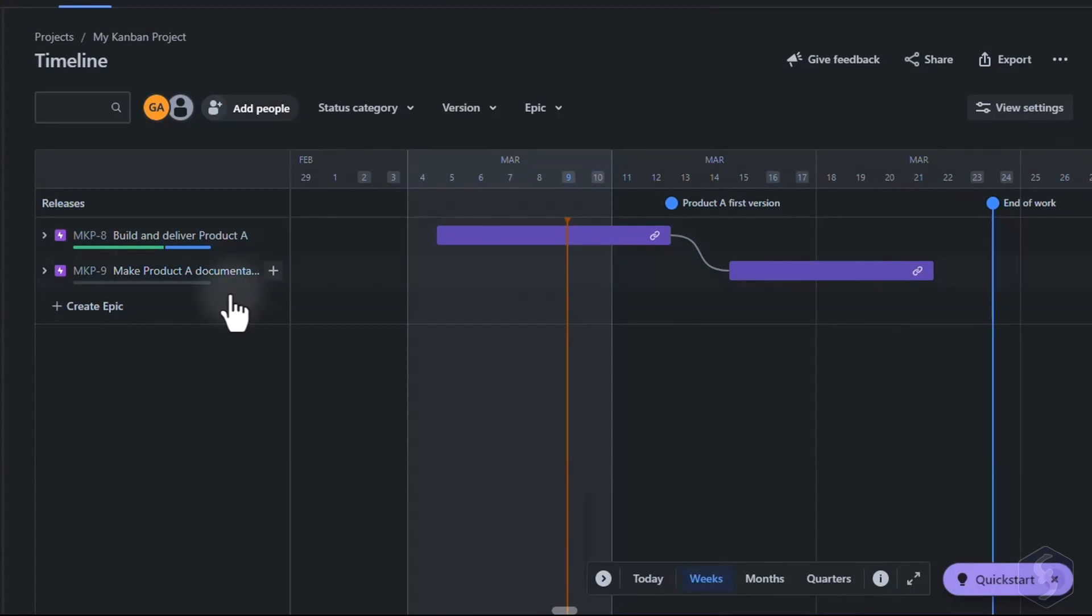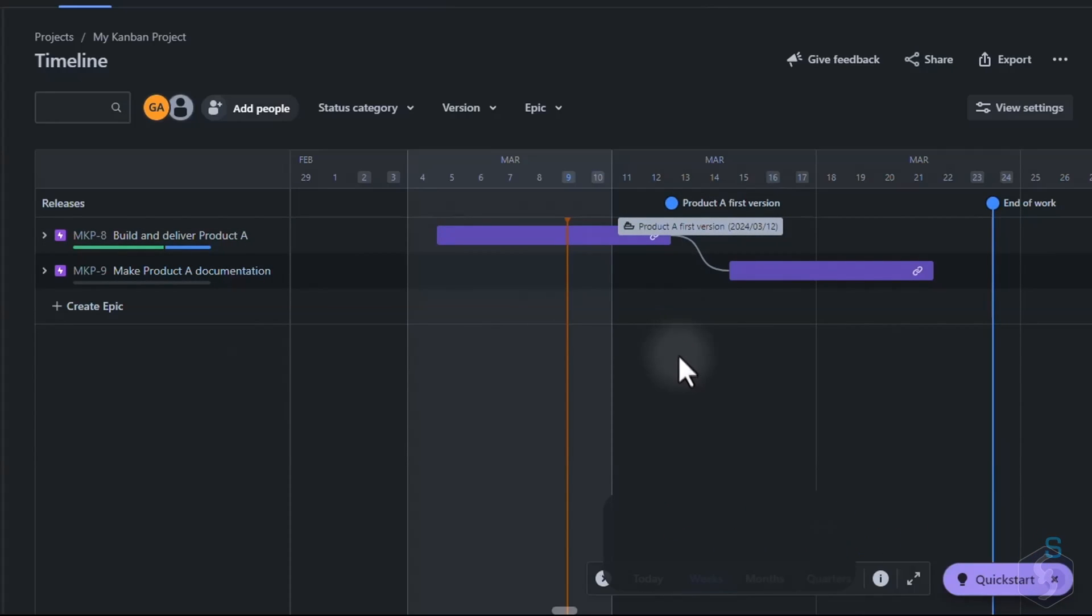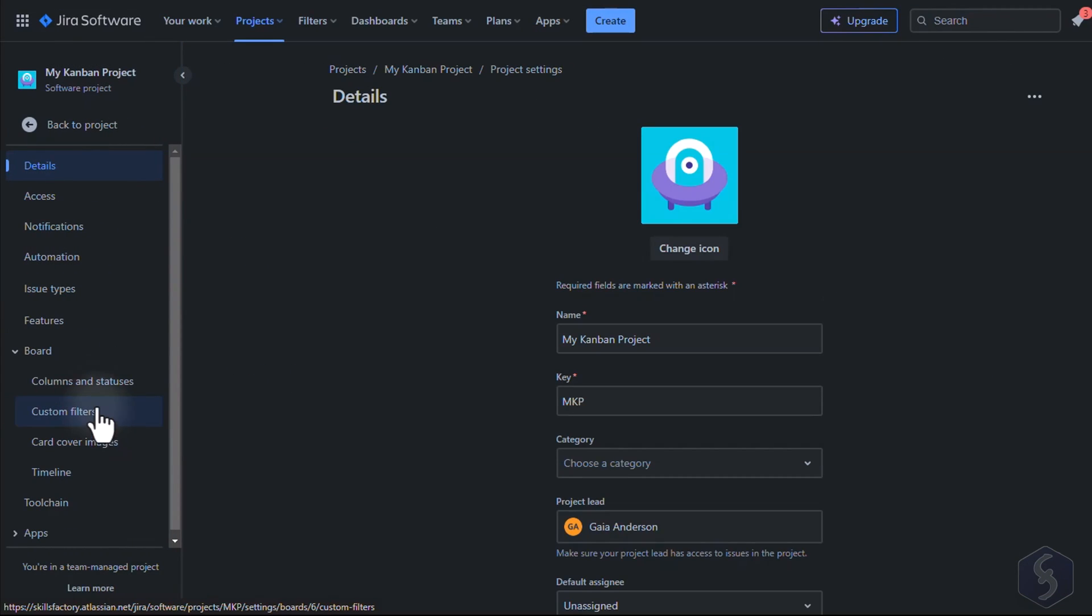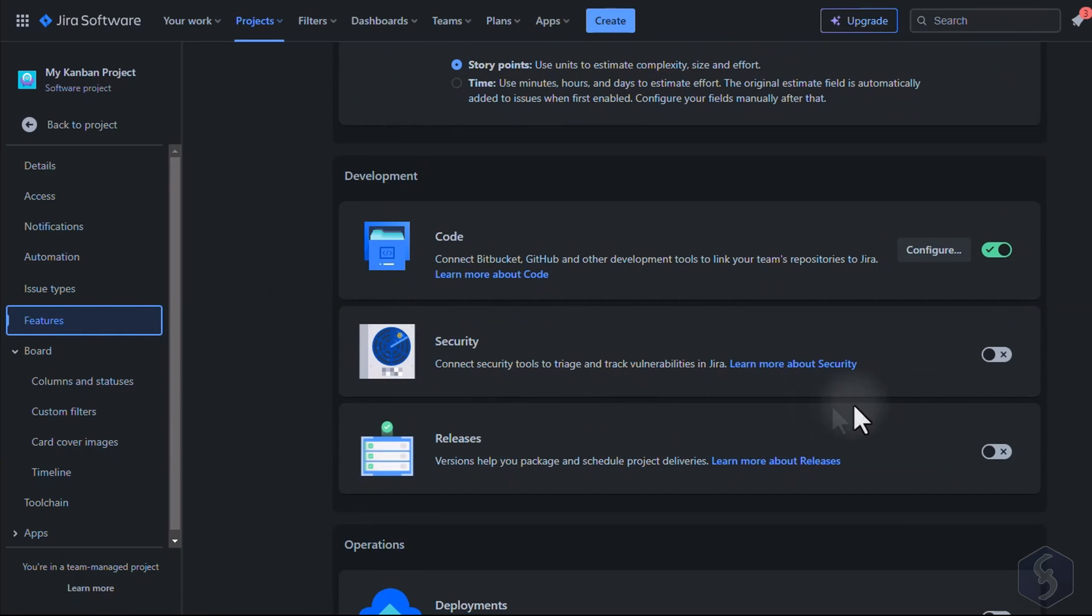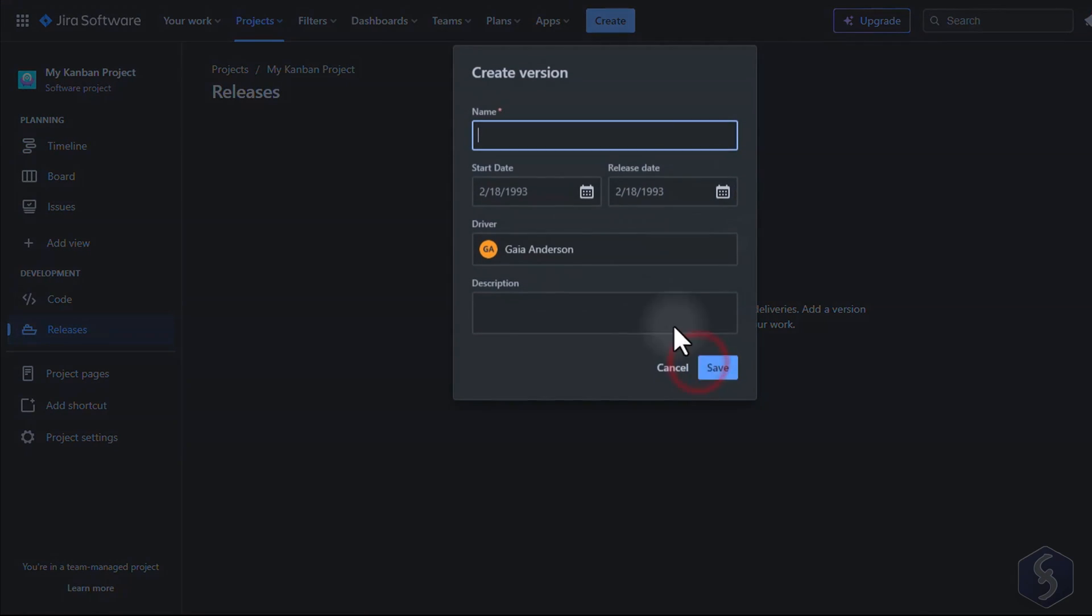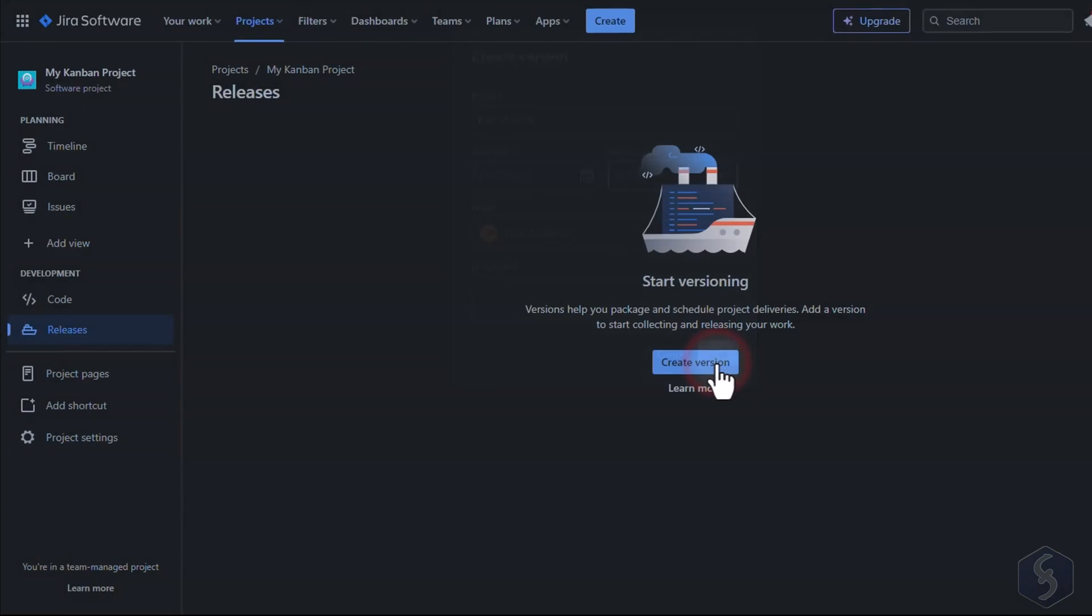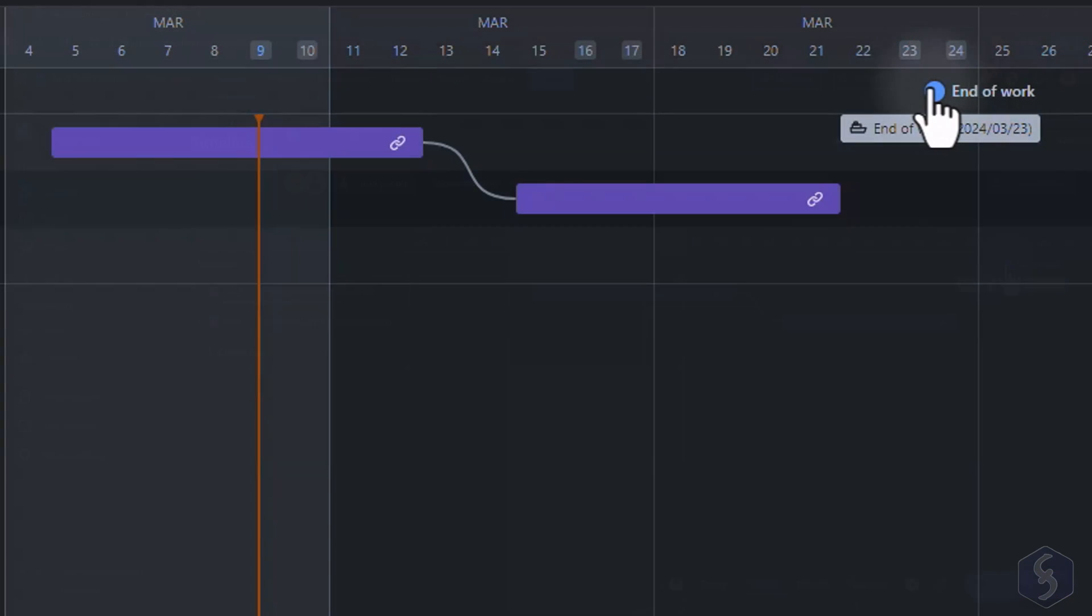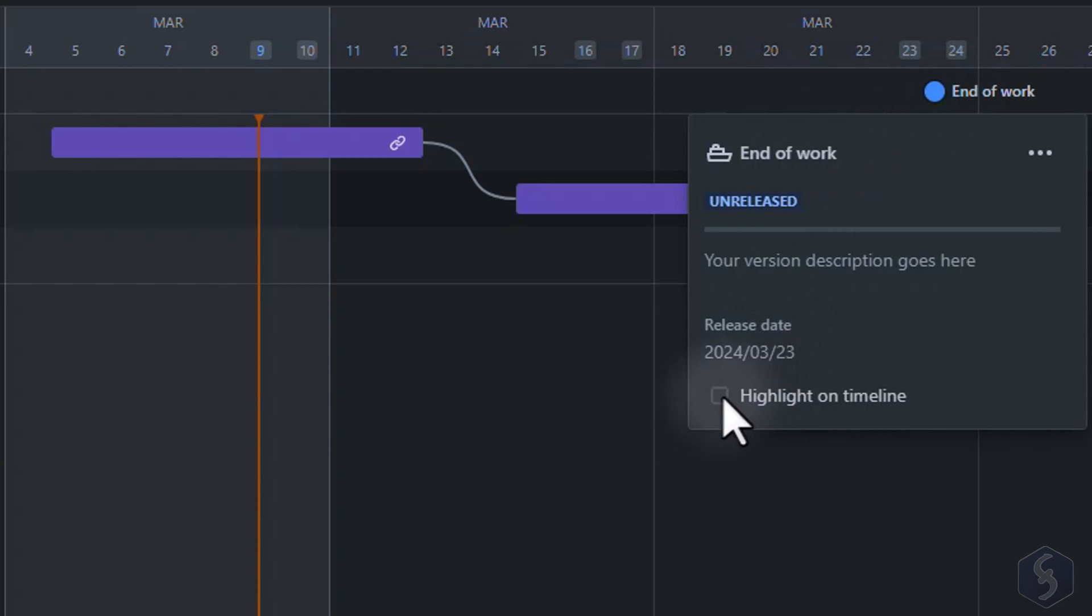You can also add versions to your project used to identify further product releases or phases but also to set project milestones. Enable versions by going to Project Settings, Features and toggling Releases. This shows the Releases section where you can create a project version with a name and a release date. This is shown on the timeline on a dedicated row where you can click to check details or highlight it better on the timeline.